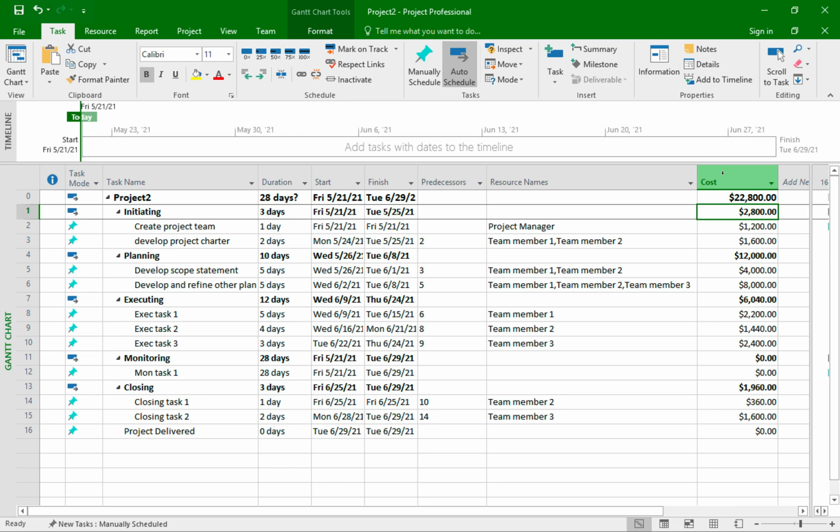So again, I created this sample project for you as a demo to show you how to use Microsoft Project and the basic skills needed to maneuver within this application. Now, your own project tasks for this assignment will be different than this demo, but the concepts are the same as in this video. You will need to build your task list, which is your WBS, and this is based on your task list for either the MAA or the Husky Air project. Give each task a duration, a start and end date, and set predecessors, as well as resources.